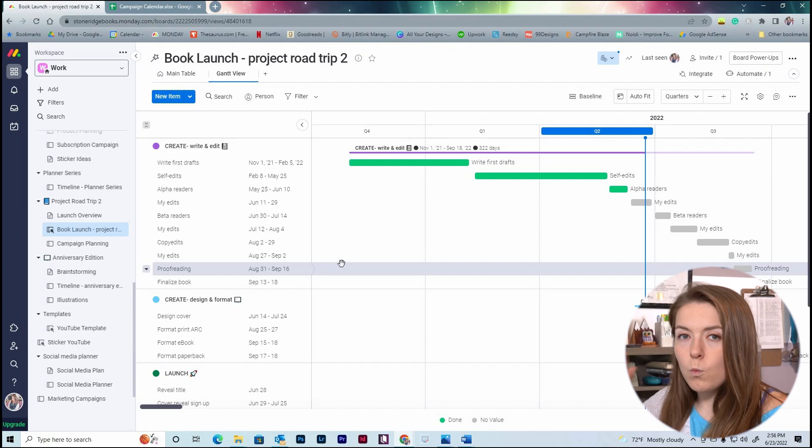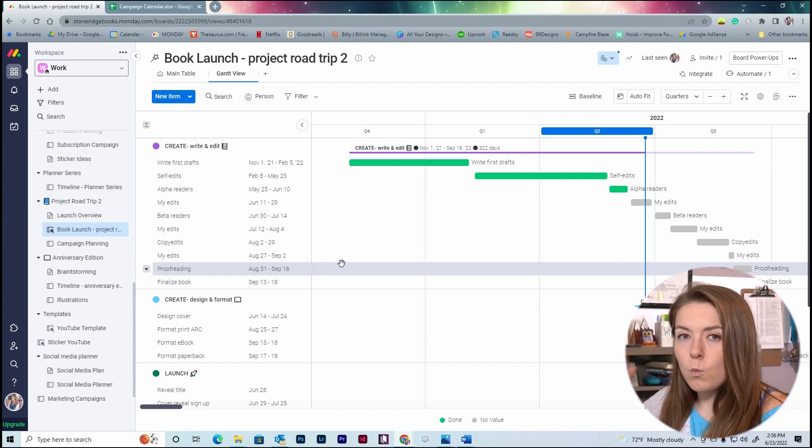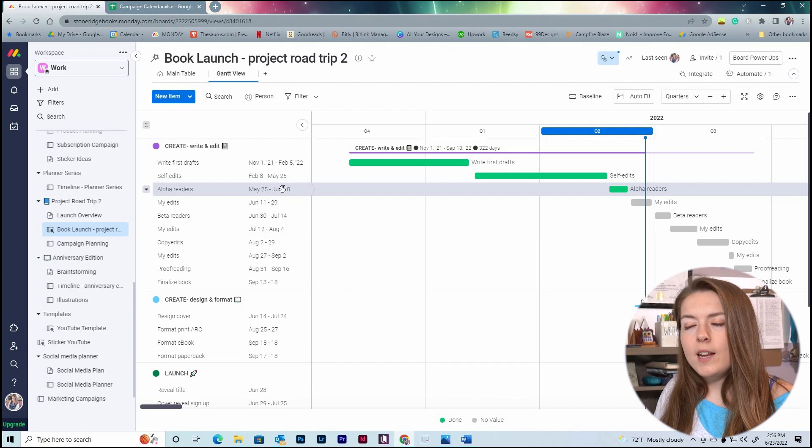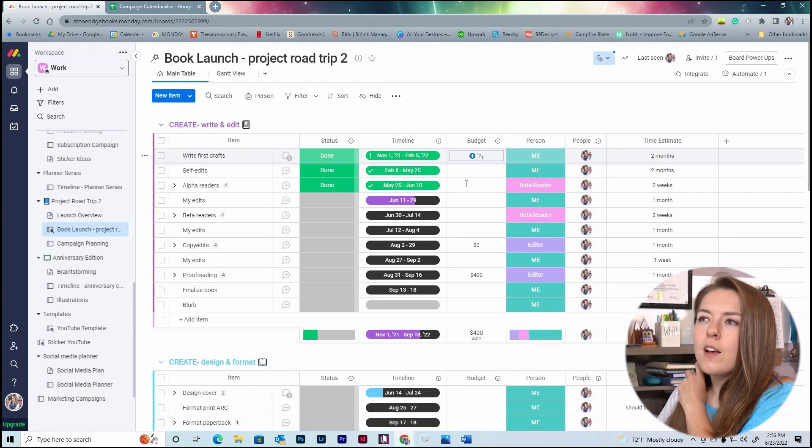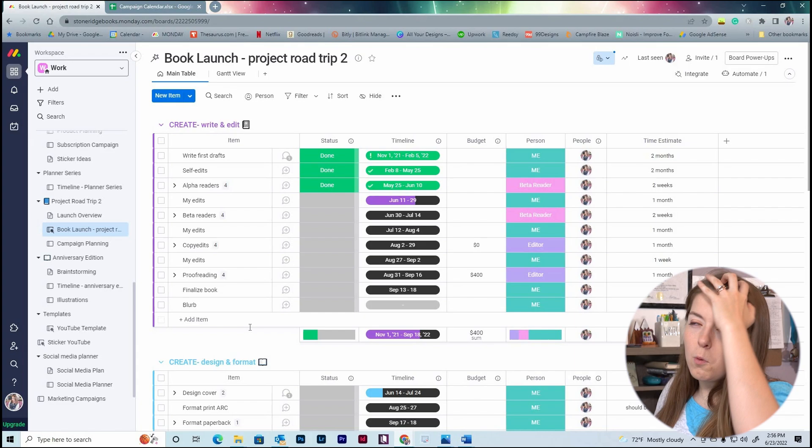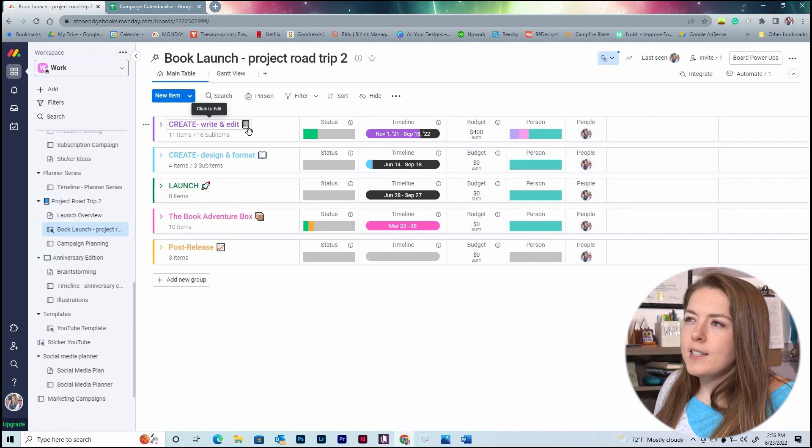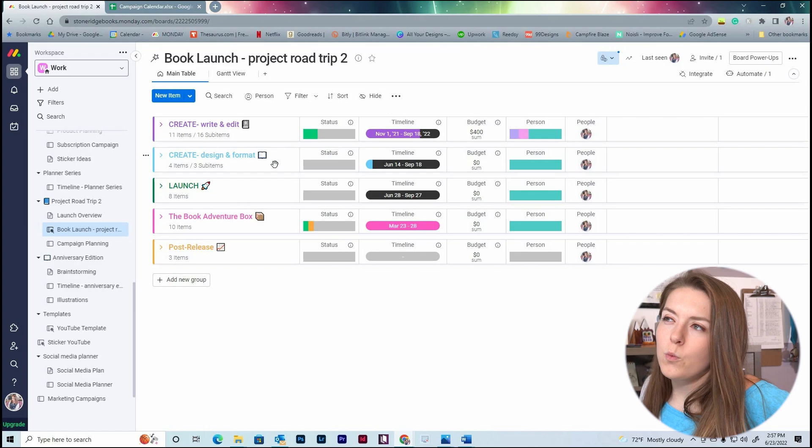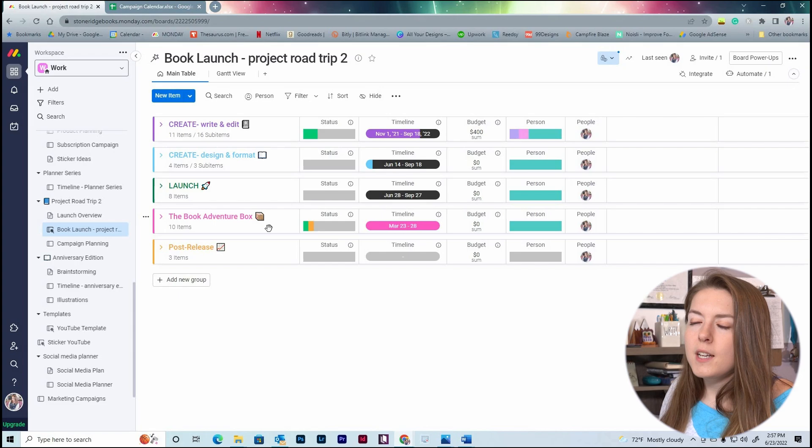Today we're just talking about the book publishing timeline because it is so visual. This is a Gantt chart that you can create directly in Monday. So we have our main table right here. This is kind of where you start out. Just like I did for this Gantt chart, I broke things out into sections, but I actually broke it out even more. I have the create section, which is write and edit. The create a second section, which is design and format. The launch section, the book adventure box, and then I have another section here which is post-release.